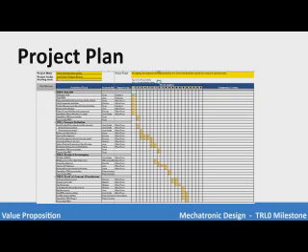This is the project plan. Here are listed the activities that we will be developing throughout the semester, with the aim of having better organization to work. The activities that stand out the most are presentation TRL0 kickoff on week 2, presentation TRL1 concept definition on week 8, presentation TRL2 design and prototyping on week 11, and finally presentation TRL3 proof of concept and conclusion on week 16.